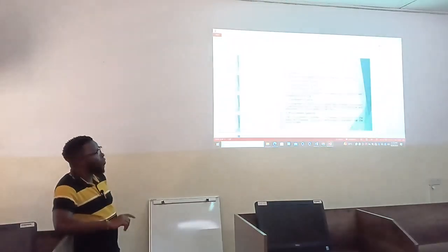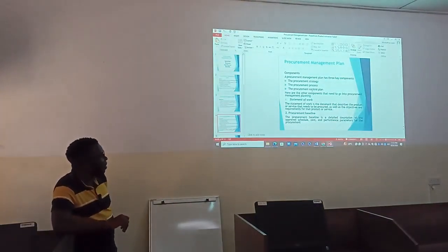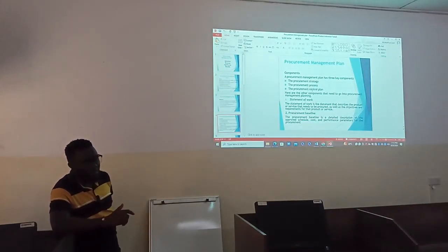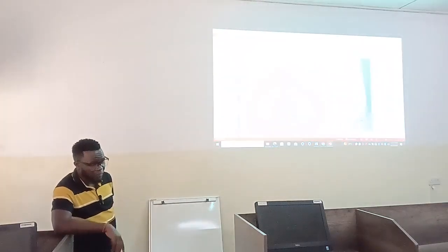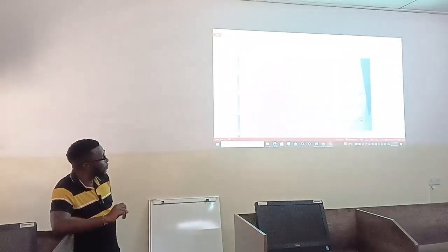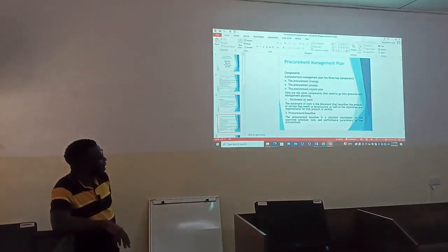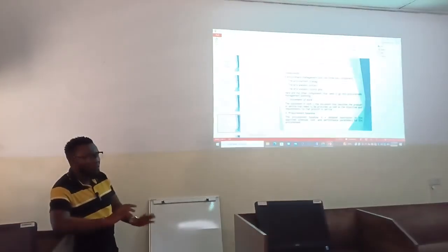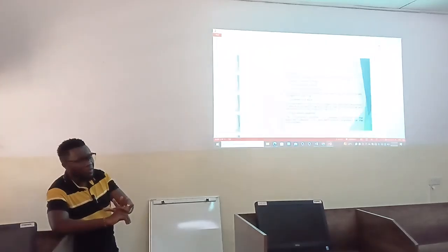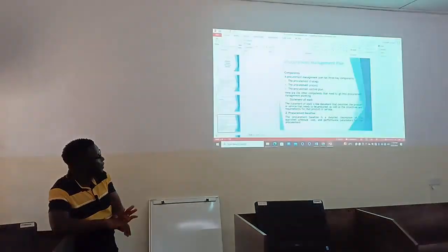That is the SOW. So in this plan that we are trying to draw, the plan that we are trying to come up with, at least that statement has to be part of it. So we have the plan, which is a guiding document, but in that guiding document, we have the SOW. The SOW is only there to describe the service and the products that we are trying to procure, and the objectives. So a SOW is a component of this bigger plan.